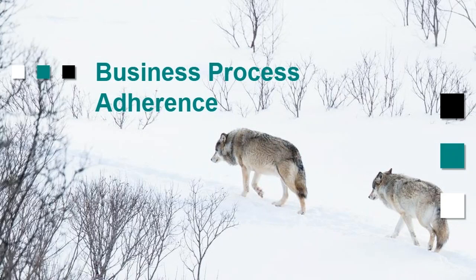It's all about getting things in alignment in Primavera. So when that information is pulled out, it's going to work with other systems. This means standard coding structures, WBS, and UDFs. All of those things are important so those schedules can be extracted and compared.